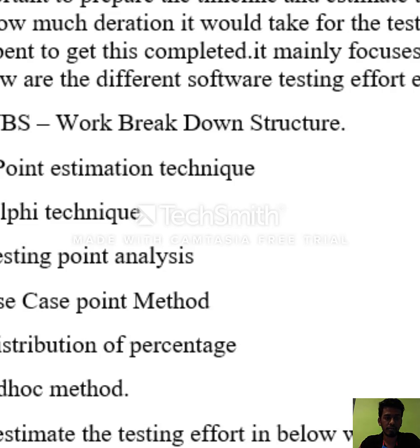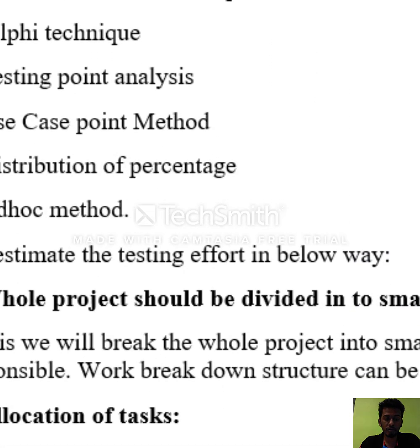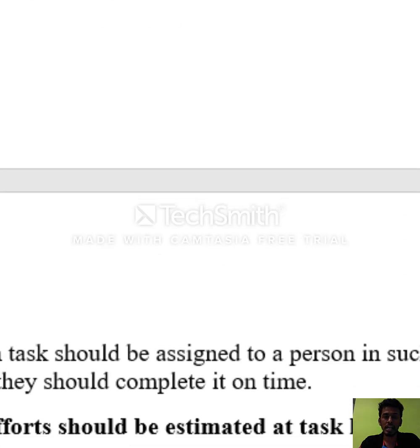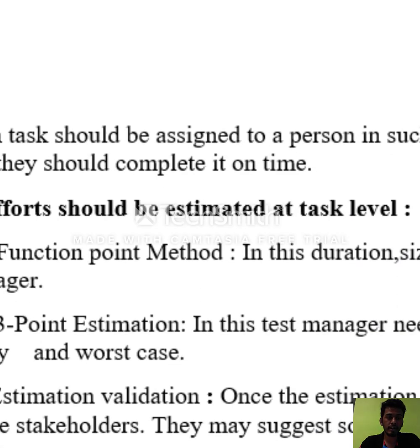Estimating testing effort. In estimating testing effort, there are different techniques: work breakdown structure, 3-point estimation technique, Delphi technique, test point analysis, use case point method, distribution of percentage, and ADCO method. We estimate the testing effort in the following way. The whole project should be divided into small tasks. We break the whole project into small tasks which a person can handle and be made responsible for.